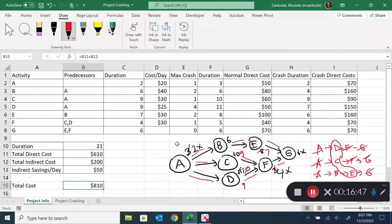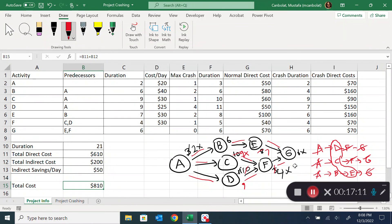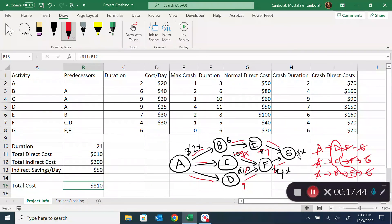At 21 days I no longer enjoy the savings from crashing. Also, C cannot be crashed more than once — it's now maxed out. D and E could be crashed further, but it's worth pausing to consider: can I go from 21 to 20 days? The answer is no, because path A-C-F-G has no remaining crash options: A is done, C is done, F is done, and G is done.